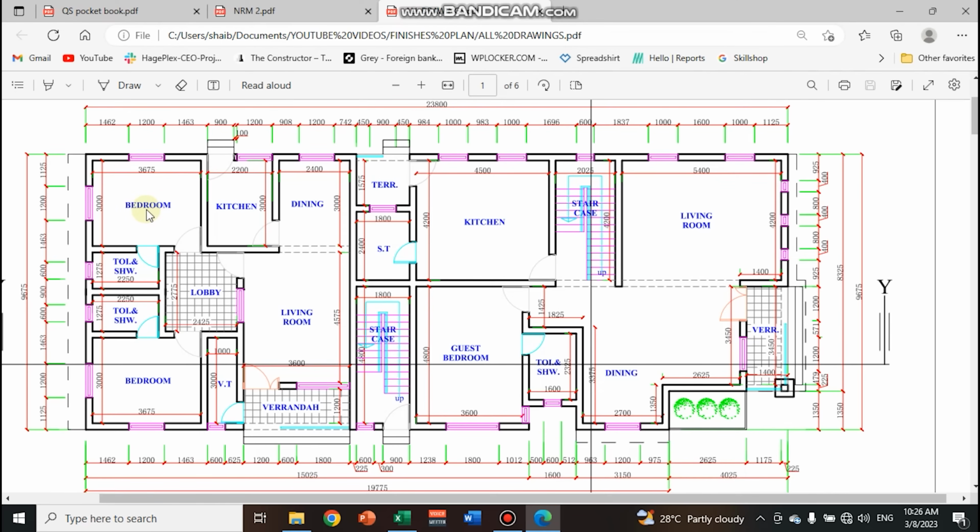You just need to take note of it, that you take it room by room in order to prepare your bill of quantity. So like I said earlier, if the specification gives you a different type of tile for these bedrooms, and then the tiling in the toilet and kitchen are different from the ones you have in the bedroom, so you have to take note that you take care of the bedrooms first, you describe the type of tiling and then the screeding,